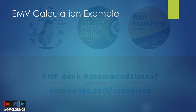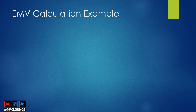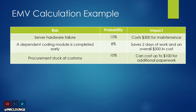In this example table we have three risks. Risk one is server hardware failure — the probability of this risk materializing is 15%, and if it does you will have to pay $300 for maintenance. Risk two is a dependent coding module being completed early — the probability is 8%, and if this happens it will save two days of work and $500 in overall cost.